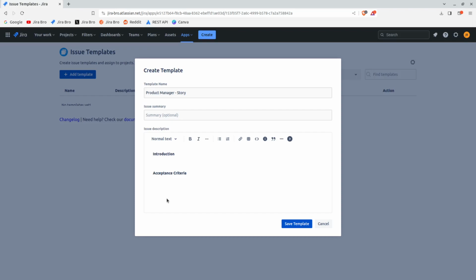Now, there are actually some rules in writing the acceptance criteria. Usually it consists of a couple of steps that need to be taken, and it is recommended for these steps to be numbered. Why? Because QA can take a look at this and test them one by one, and on the daily stand-ups they can reference and say, hey, I stumbled upon a bug on step 1B, 1C, or something like that.